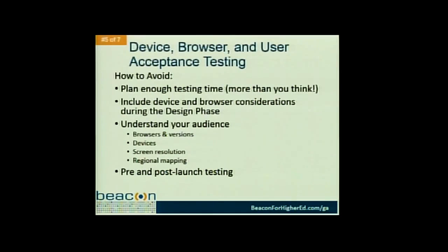And that's not just time actually spent in front of the screens testing everything out, but that's actually time on your project calendar also. So when you're looking at your launch date that you're going to plan for, make sure that you've got enough time after everything's on the site in the demo environment that you've allowed for all stakeholders and testers to go in there and perform everything that they need to.